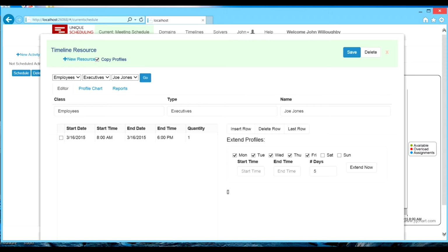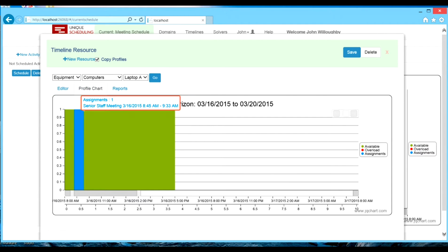So let's look at the resource profile. That shows the offset as well. Most scheduling systems assume that all resources are used for the entire duration of the activity. The FAST system does not have this limitation. We can specify as many on and off intervals within the activity as you want. This again supports a much more accurate description of the capacity of whatever environment you're trying to schedule.